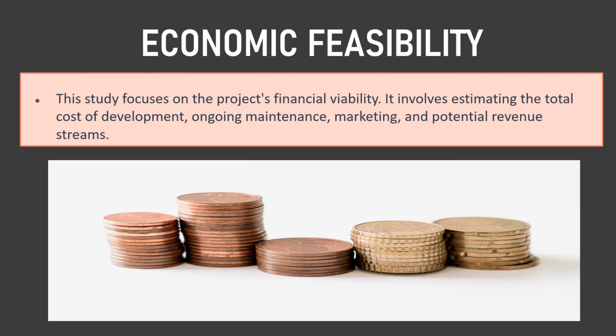After evaluating the financial projections, they found that the app was economically feasible and had the potential for a positive ROI. Some of the aspects which can be checked are: what are the development and operational costs of the project? Can the project generate sufficient revenue to cover the costs and provide a profit? What is the projected payback period and return on investment?